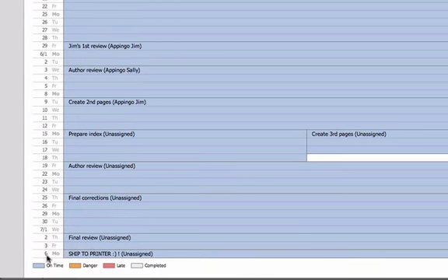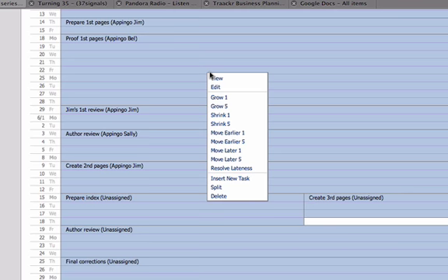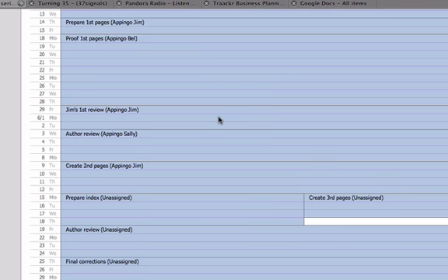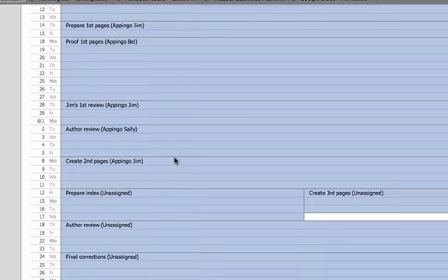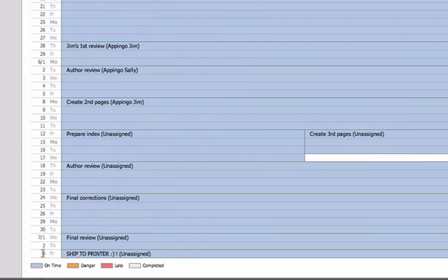The important thing to note is that this flows through the entire schedule. So now our ship date is moved from the 3rd to the 6th of July. Now, if I wanted to get that ship date back to the 3rd, I can take a day away or shrink another task by a day, and if you'll notice, the ship date is back to the 3rd.